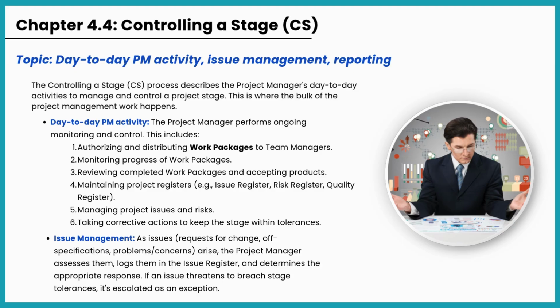Day-to-day PM activity includes authorizing and distributing work packages to team managers, monitoring how work packages are progressing, reviewing completed work packages and accepting deliverables, maintaining project registers like the Issue Register, Risk Register, and Quality Register, managing project issues and risks, taking corrective actions to ensure we stay within agreed tolerances.